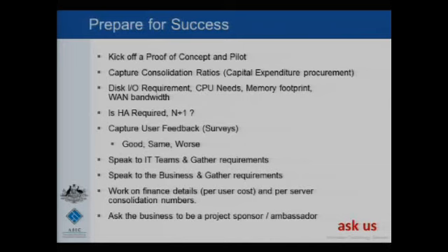People that were on the proof of concept said, we love this, we're not going back to a physical. I was like, oh no, I need to get that infrastructure back so I can use it for another project. So we ended up buying a few more servers, but we left the people that love this on the virtual desktops, and we called them ambassadors. We got them to speak to other people in the business. It was a lot better than IT preaching to the business, saying this is what you need, this is what you want. Other business guys walk around saying, this is cool.